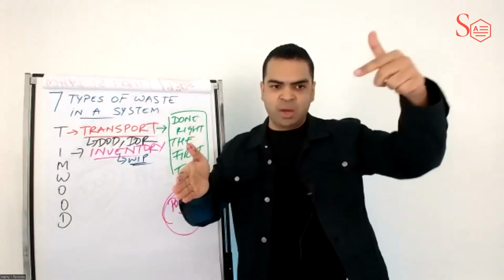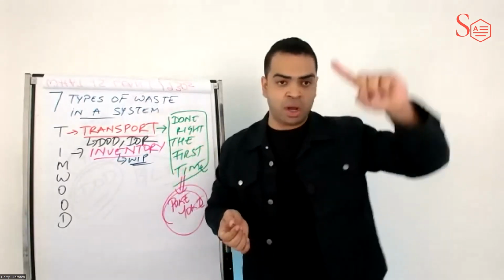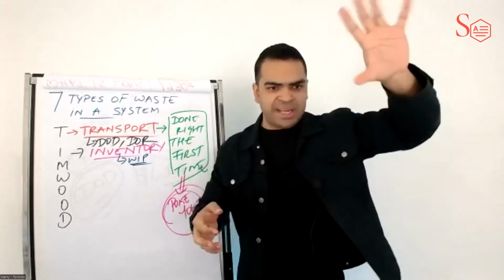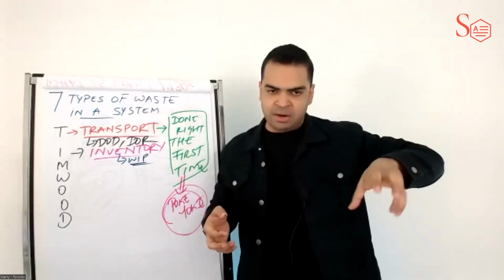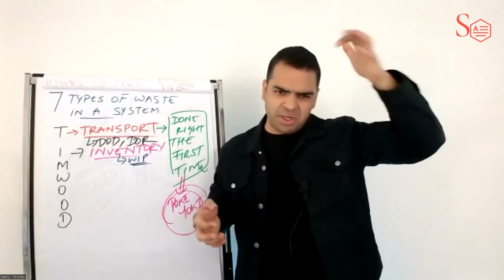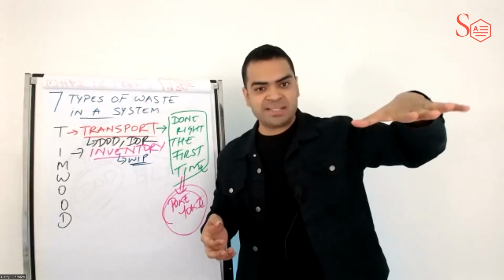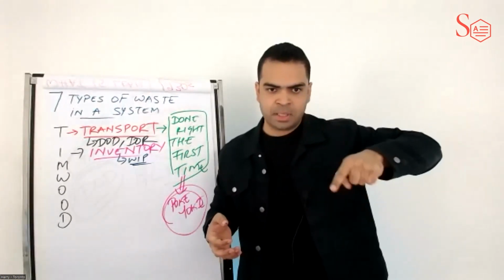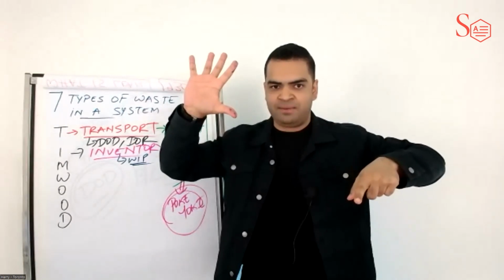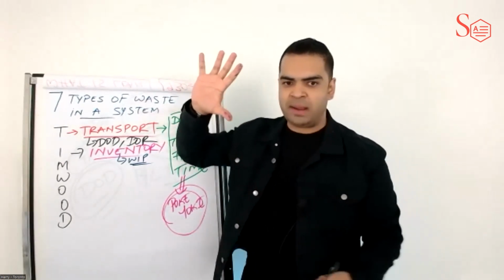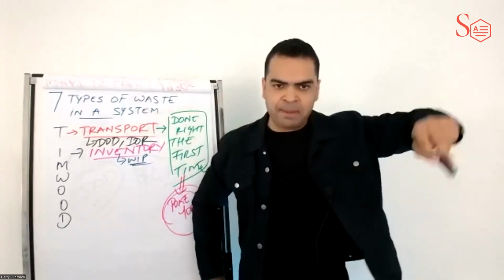And since we have equal capacity allocated to each car, one person is washing each car, each of those cars would get done approximately around the same time. You with me? Because we had equal capacity, they should get done around the same time, which means they go into QA as a batch of 5. Now they bottleneck the QA process. Do you see a lineup building up?